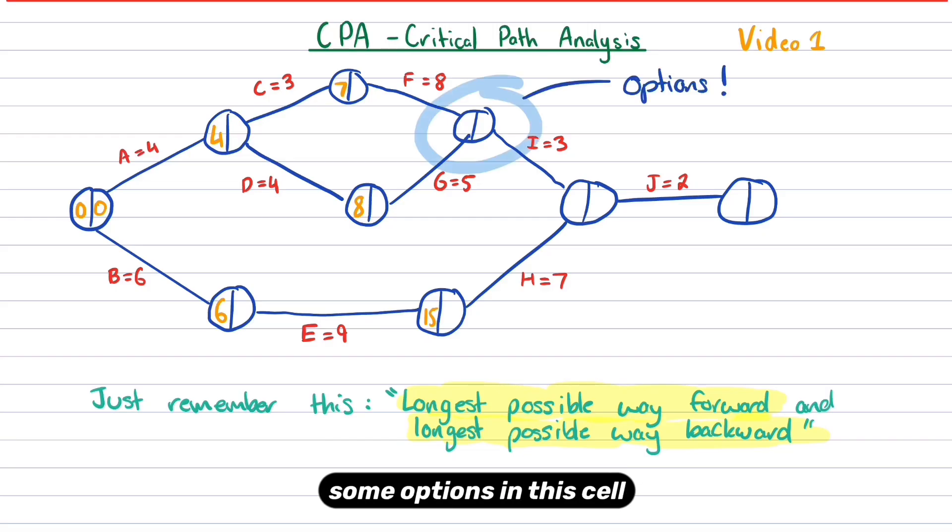Now, this is where we've got some options in this cell. So we could go three and eight, which is along the top, which equals 11. Or we could go four and five along the bottom, which is from D to G. Now, remember, we want to choose the longest way possible. So three plus eight is 11. Four plus five is nine. So we're going to go the three plus eight way, which means I'm going to do seven plus eight, which gives me 15. So that's the way that we have to go. We're going the longest possible way forward.